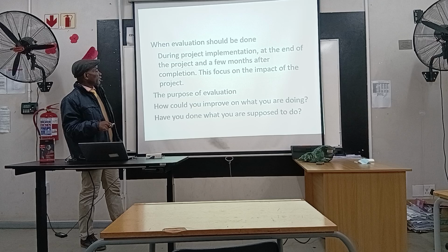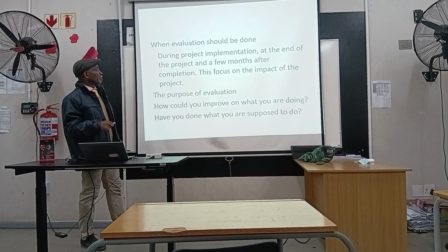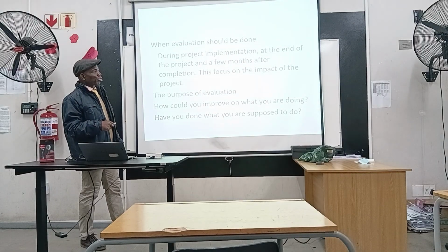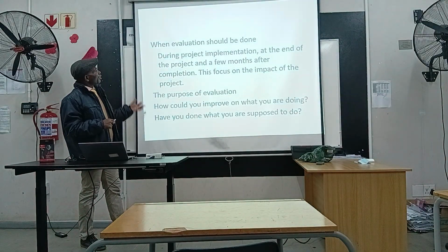Then you have the one at the end of the project, whereby one can look at the achievement of the objective of the project, looking at the deliverables as well as the impact, the product of the project. Then the one that is done a few months after the completion of the project is focused on the impact. We call it postmortem.